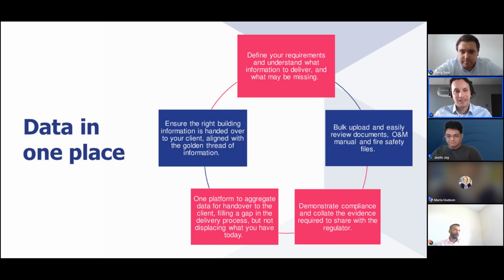So I think that leads nicely into what we want to talk to you about next, right? It's pulling all of that key building information into one place. So starting with defining the requirements up front, early engagement, and setting out a clear mechanism for what is going to be delivered on a record by record basis, the granular detail that Jess spoke about, the timelines of when it's going to be done, and being able to track that delivery throughout the construction phase in terms of compliance, what's being received and is going through the workflow, and what is still outstanding.